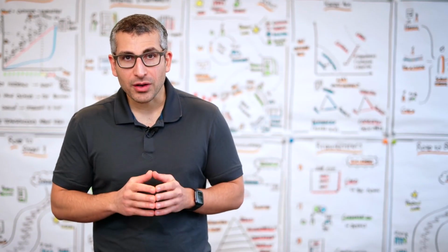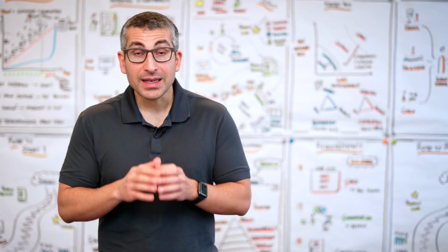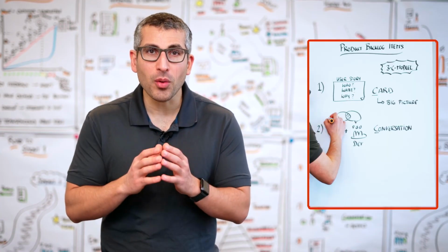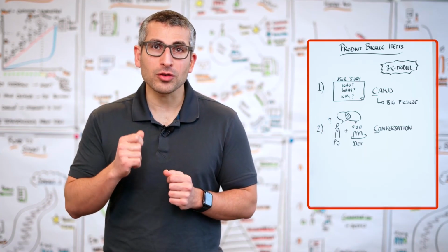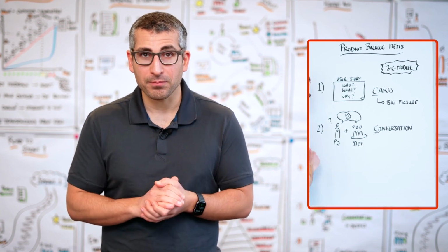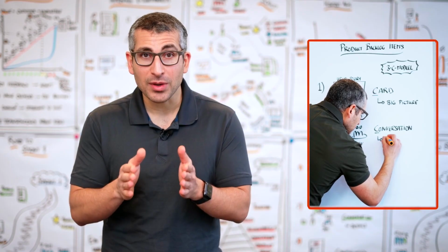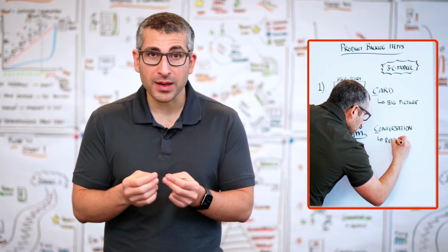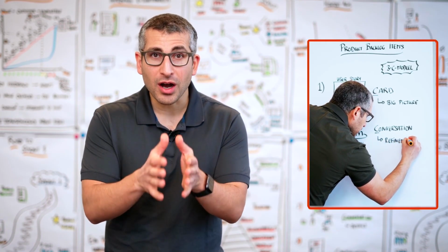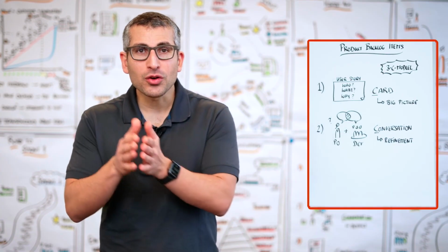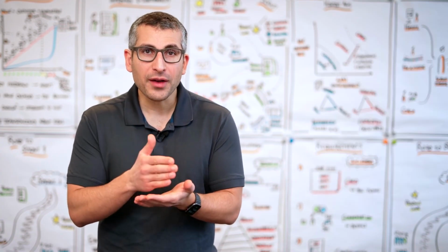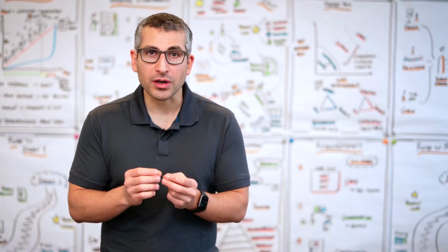A third scenario is that the product owner says, great question, I have no idea. Let me go back to my stakeholders and check with them. And then it's really good if you have a few days' time between product backlog refinement, which is the piece where this conversation takes place, and your next sprint planning, when you have to determine how much work fits into our sprint.